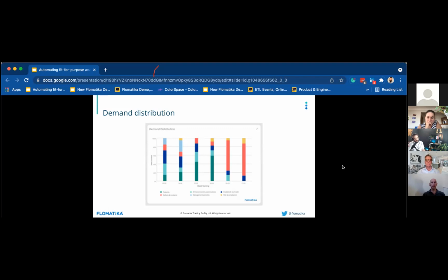And this is one of the biggest challenges that organizations are facing when they are pivoting from a project paradigm to a product paradigm, when they have long-lived teams, where the funding has been changing from funding projects, which has the iron triangle of fixed cost, fixed scope, fixed time, to being only fixed cost and open scope, open time, right? So now they are funding capacity, but they lost a bit of control of where is my capacity going. You know what I mean?